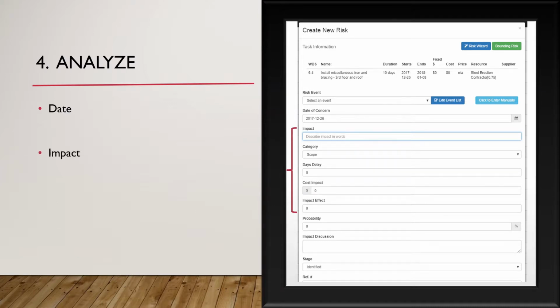The impact also, it can be either impact on the quality of the project, a schedule problem, a delay, or a cost overrun. Include also an estimate of the likelihood that this risk is actually going to happen, and as well assign an owner to each risk. This person is responsible for monitoring the risk and preparing mitigation alternatives. As we know in management, anything without an owner doesn't get done. This analysis forms the heart of the risk register content.